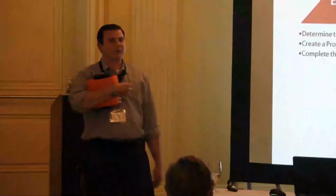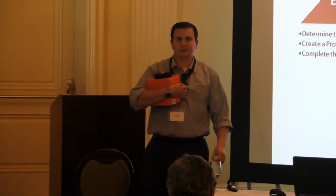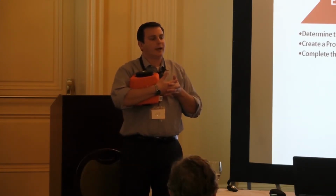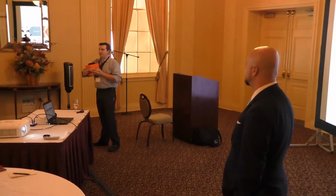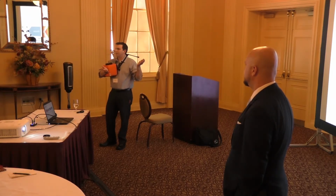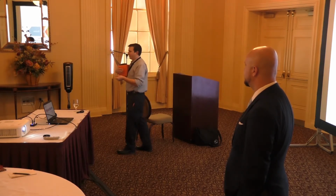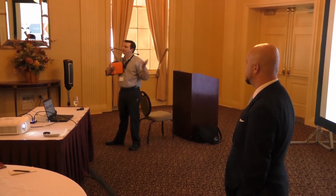So we try to make this as open and inviting as possible. With our teams, when we get to the end of design and we're thinking about actually moving forward and implementing this thing, we'll say, okay, let's pretend we've gotten all through this design stuff. Let's pretend that we implemented this project and it's a year later. A year later, after this thing has been implemented, what went wrong? Tell me what went wrong. And that's an opportunity for people. You've asked them to tell you specifically what are the bad things that I'm not considering, as opposed to just asking what the risks are. Just hypothesize what went wrong during this process.